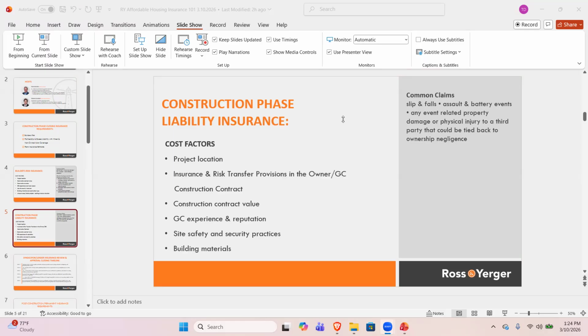Some GCs are a little bit reluctant, but we love that process because we think it's independent to that one project. You don't have to be worried about any other projects that the GC is involved in and coverage that he might have canceled. It's a safe, secure and cost effective way to insure the GC and the owner for that specific project. We've had great success with this product. It does not make sense, though, when you get below, I would say, $20 million for sure. The numbers don't add up.